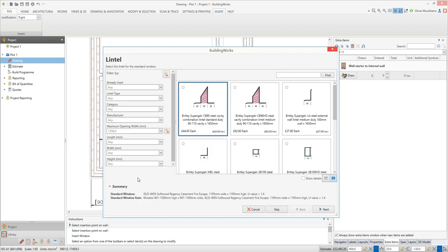After you've placed the window, the window component builder pops up again, this time asking you to select a lintel. BuildingWorks automatically locates a range of lintels suitable for your wall type, thickness and opening width. This information is essential if you're estimating as you design — BuildingWorks captures the data to cost the job. Click on the lintel you want to use and then click next.